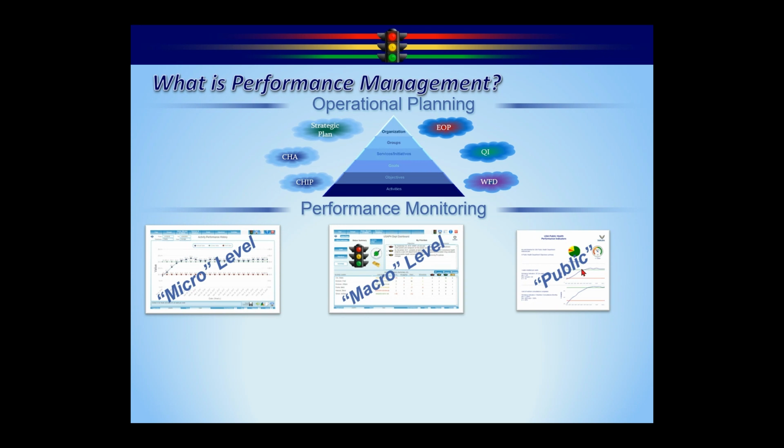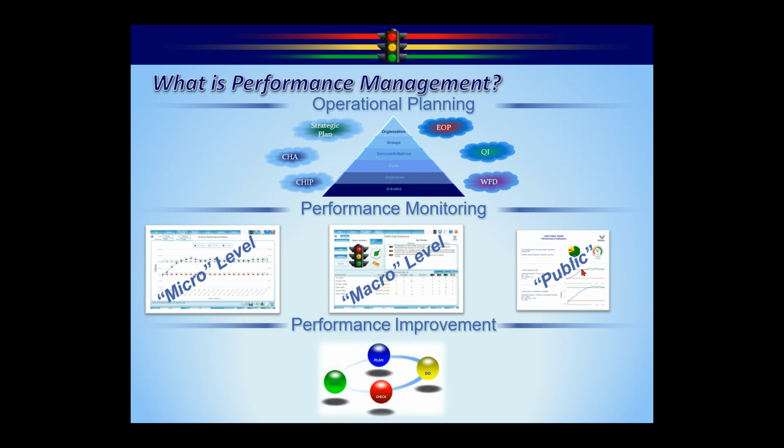And the reason that performance monitoring is critical, obviously, is because as you're going through the PDCA cycle, you get to the check phase. The check phase is comparing plan to actual. Well, performance monitoring is the actual. So in order to be able to understand where you are, you need to be able to have that. And again, that's facilitated by the real-time planning, collecting the information from everybody kind of in the background.